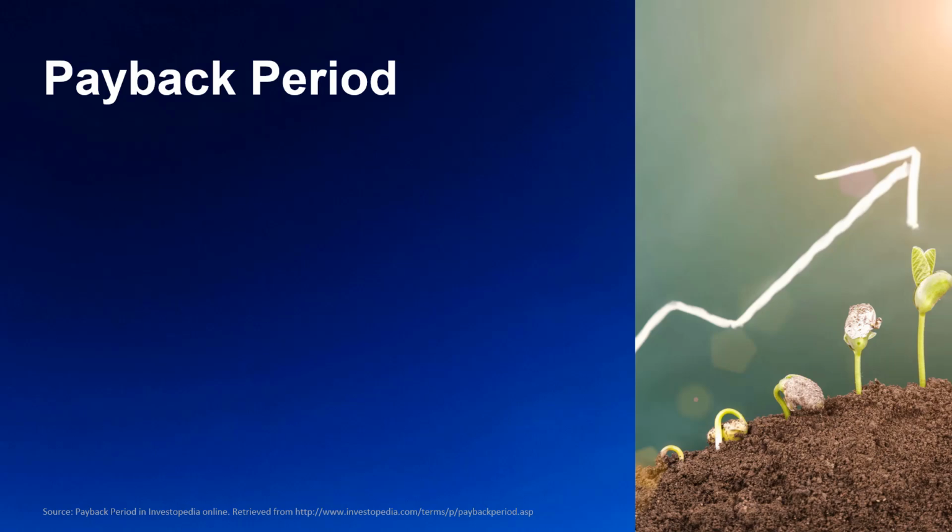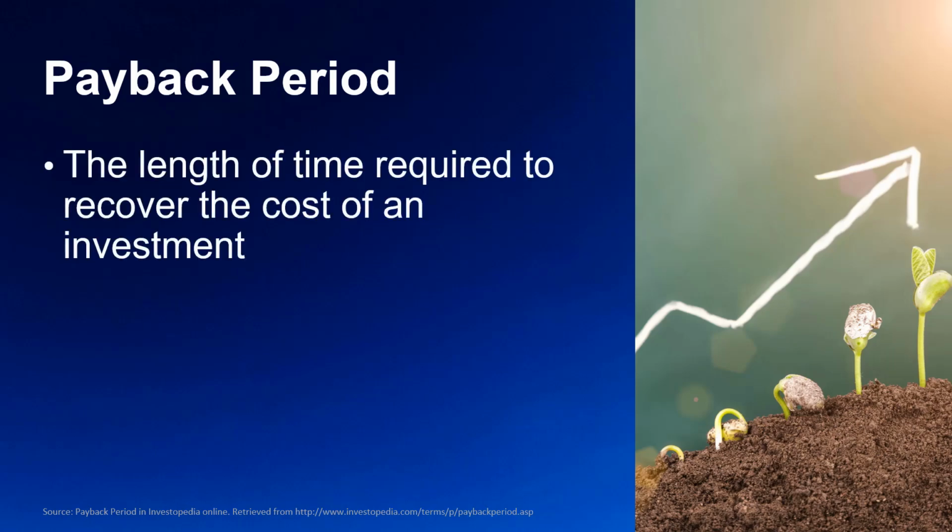To put payback period into technical terms, it is the length of time required to recover the cost of an investment. Take an example where a $10,000 investment returns $2,000 per year, and this would have a 5-year payback period. It's intuitively the measure that describes how long something takes to just pay for itself.